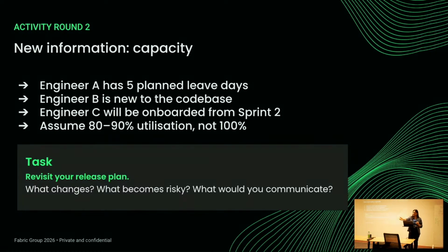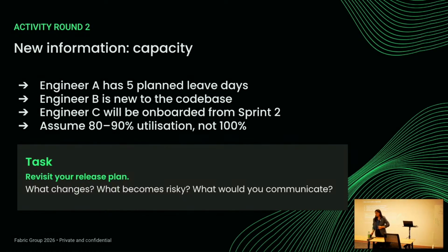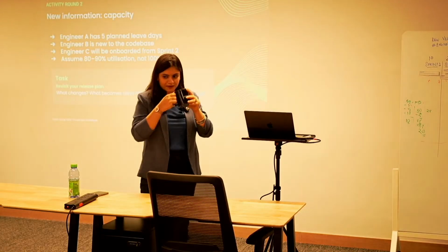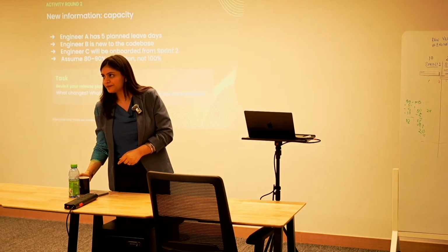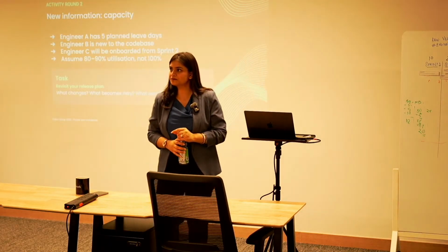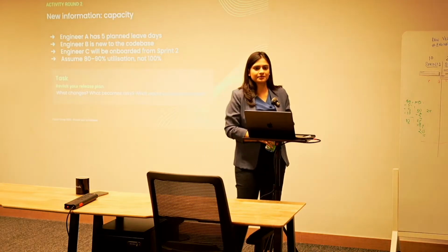I think it's the same point you were making about how you should build pessimistic plans. It's not really underestimating, it's being more realistic about how much we would really be able to achieve, accounting for uncertainties. As a team, we can have our stretch goals, for example let's try to do 28 points, but that does not get baked into your release plan.